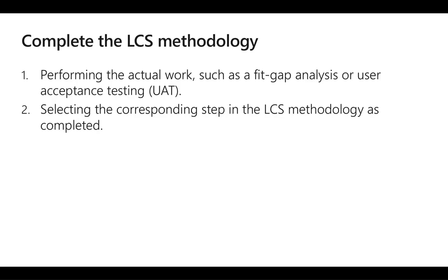To complete a phase in Lifecycle Services, we first need to complete every required step in the phase. When all steps in the phase are completed, we can complete the whole phase. We can always reopen a phase later if we need to make changes.